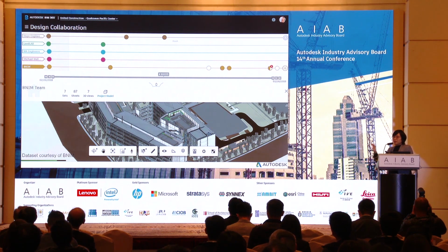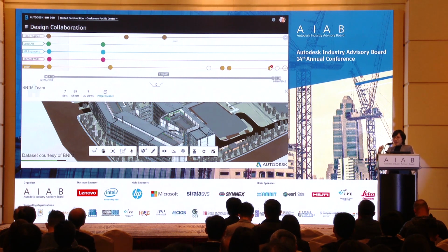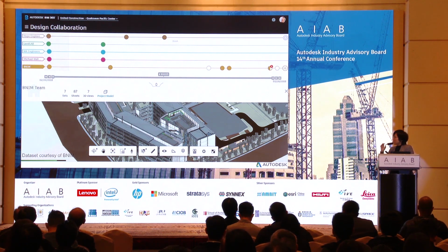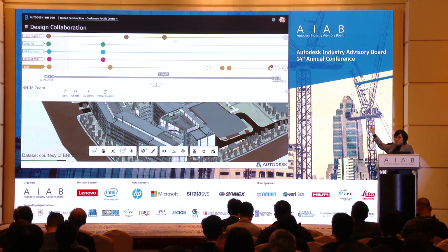A solid bubble means that you have published the work, and another team has consumed your work. But an empty bubble means you have published, but your work maybe has some problems, and they don't want to consume your models, so it is left empty. Okay? And you find that some are half solid, half empty, with some numbers, which means at that time there are a few packages uploaded here and some have been consumed.